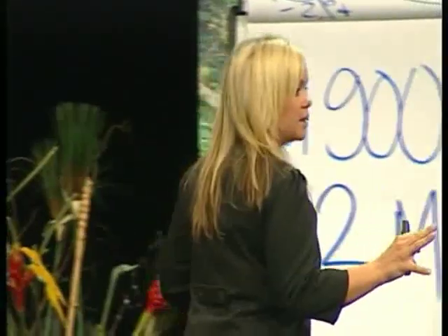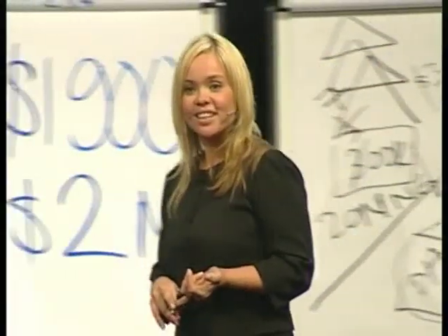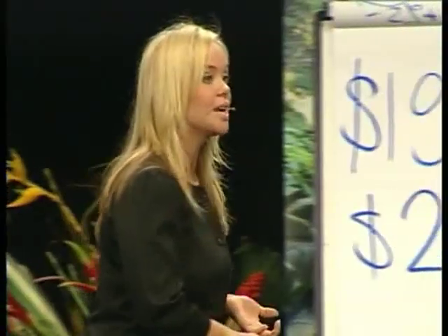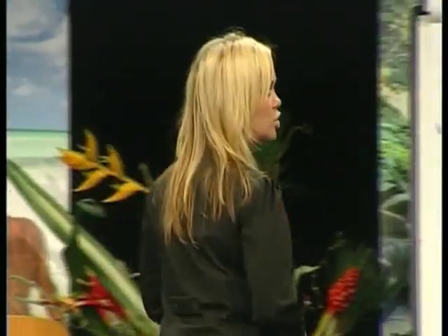The other fantastic thing to do, if you're doing your first development site, is a joint venture with the builder. So get involved with the builder. What that means is he's not going to rip you off because he's involved. He gets a split of the profits at the end, which means he's going to do everything he can to make sure it's done on time and the prices are as low as possible, because he makes his money on the profit at the end. Does that make sense? So that's a good way if you're a bit worried about your builder or how to find a good builder. Do a joint venture with them.